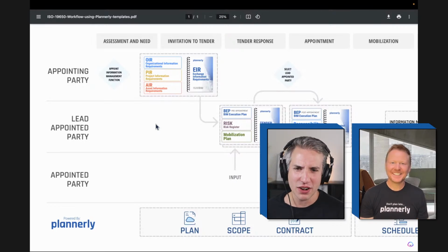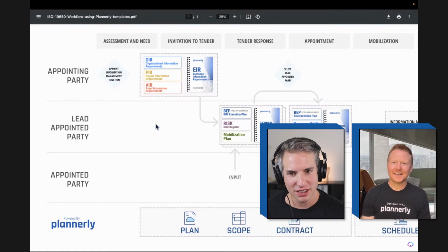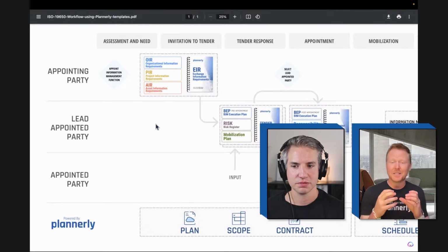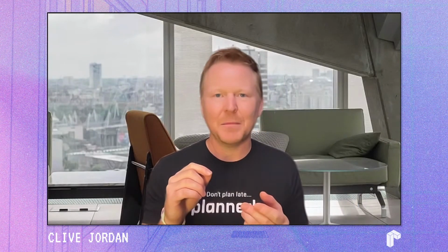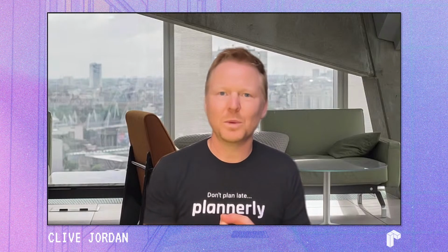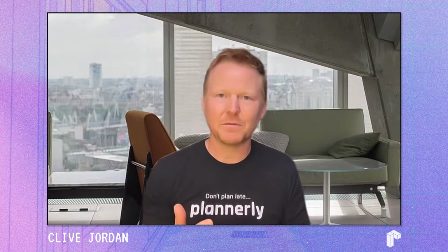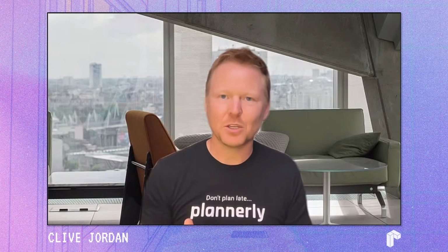Talk to me. Where is there a mandate in the UK to use ISO 19650? Yeah, so essentially inside of each region, you'll have mandates and an annex. In the UK, there's a mandate with an annex, and the annex says you will also follow certain file naming conventions and certain status codes that we use in a CDE, a common data environment, to say when a file is ready for a certain state and a certain use case.